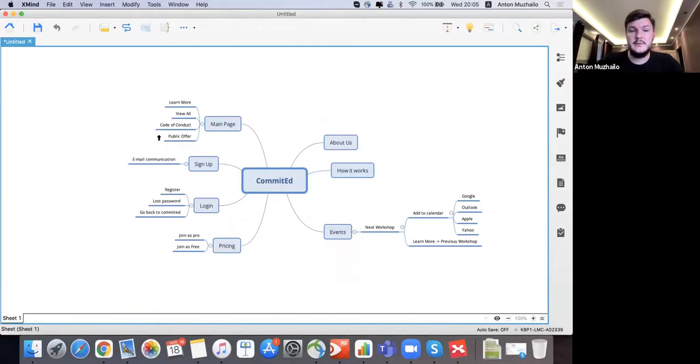this case, right? So following this logic, let's just calculate it. 25 positive test cases plus 50 negative test cases plus 10% of negative plus 5 additional test cases. So we'll have 80 test cases in total. So 80 test cases are needed to cover this website with an estimated 100% coverage. We would assume 1 engineering hour per test case, so it will be 80 engineering hours.